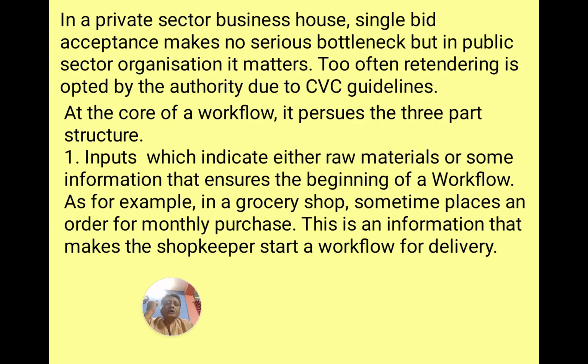According to the guidelines or directives of CVC, that is your Central Vigilance Commission, they have given the directive that if there is a single bidder at the end of the total process of tendering, only one bidder's quotation is available, then retendering may be adopted. Too often retendering is opted for by the authority due to CVC guidelines.